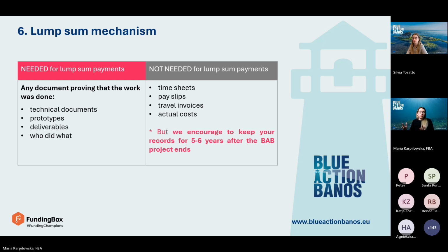And at a milestone given, all the required documents must be submitted. Next, they are evaluated and payments are validated by the selection committee and transferred to beneficiaries. Okay, we pay against project progress, project results.